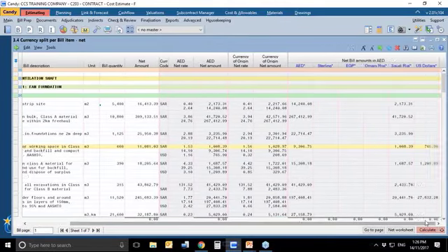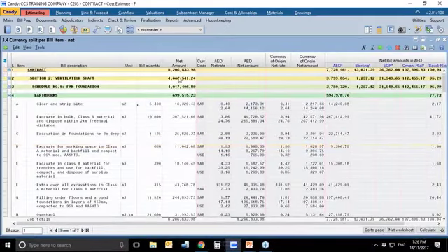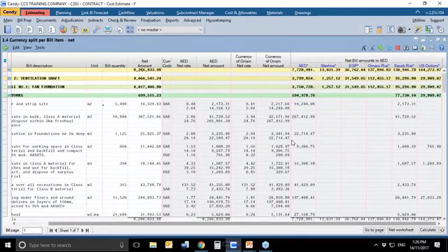So if I click on calculate, it shows me that the net total for this project is 8.2 million dirhams. However, on this project, you need to budget for 7.7 million dirhams. You will be buying resources, you will be adding resources worth 7.7 million dirhams. You need to account for pound sterling worth 13,000 dirhams, Egyptian pound worth 36,000 dirhams, Omani Riyal worth 137,000. Now you will notice these amounts for the foreign currency are shown in your pricing currency, AED.